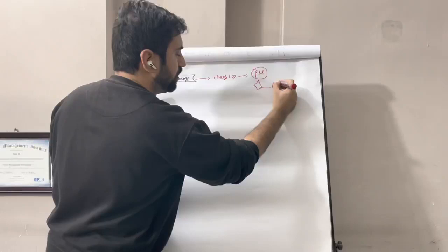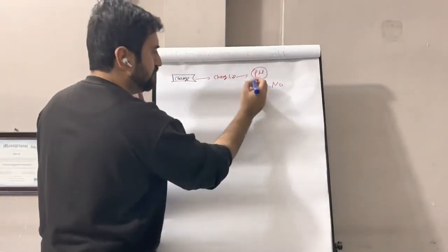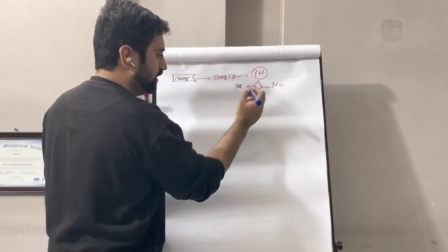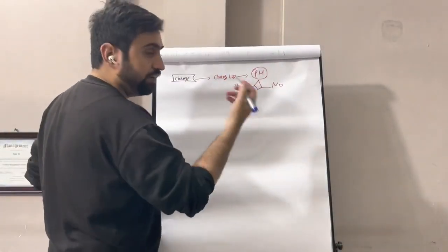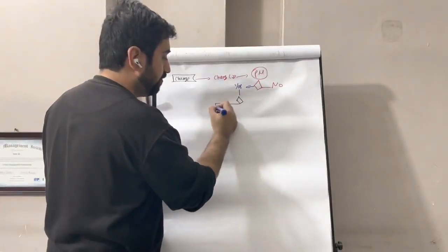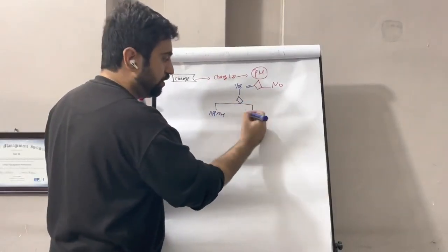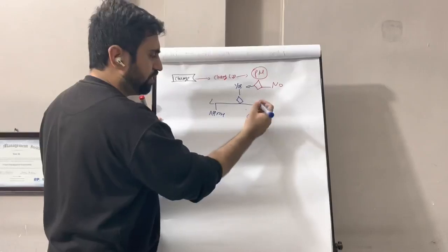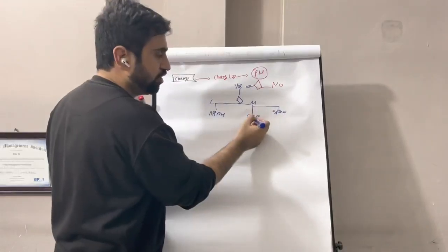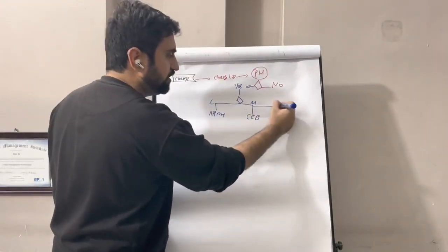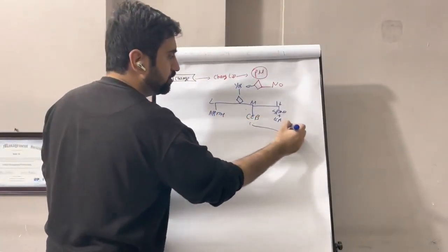If no, we provide the notice and we update that. If yes, if the change is valuable, we start doing a detailed analysis on that. After the detailed analysis, the project manager checks whether he can approve the change request, whether it lies within his authority, or he goes to the change control board. If the change is low or medium, the board decides; for a very high change, we also involve the sponsor. If the change is denied here, we say no.